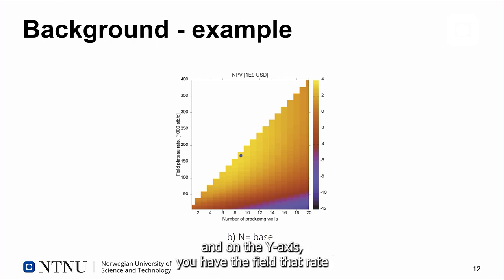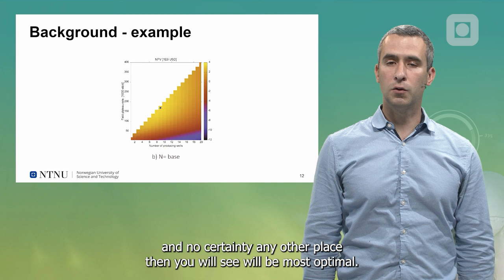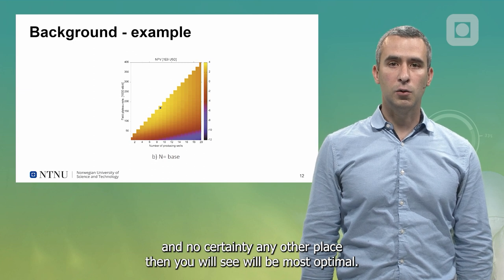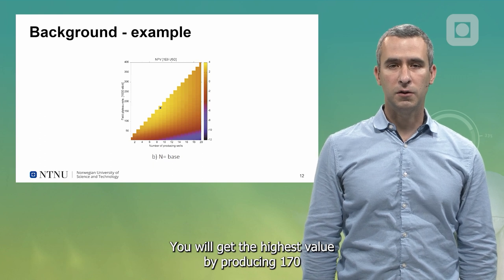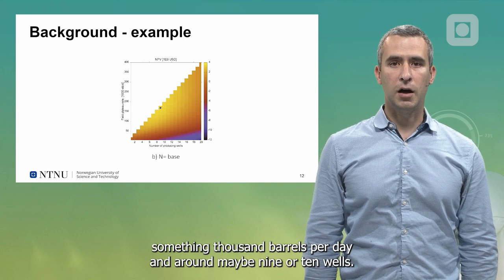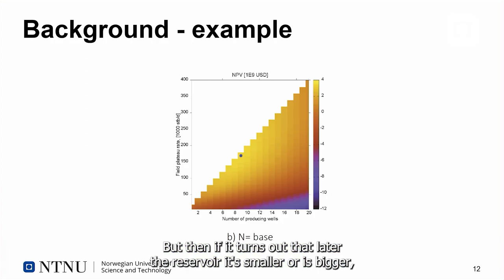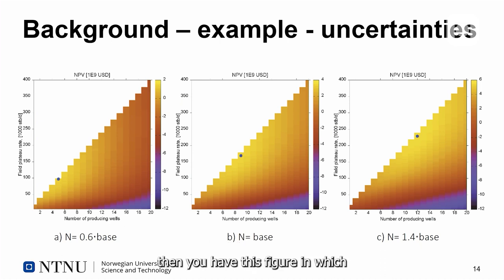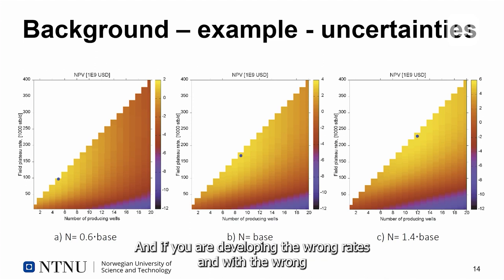On the y-axis you have the field plateau rate, and on the x-axis you have the number of producing wells. If you assume no uncertainty, it will be most optimal to produce around 170-something thousand barrels per day with around nine or ten wells. But if it turns out that later the reservoir is smaller or bigger, the values of number of wells and rates change significantly, and you will get a very different economic revenue.